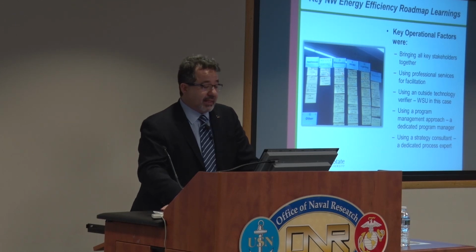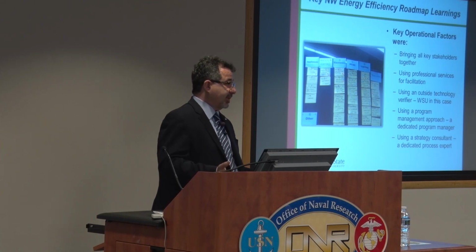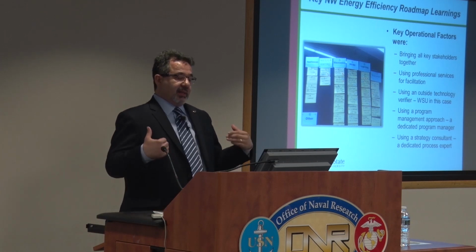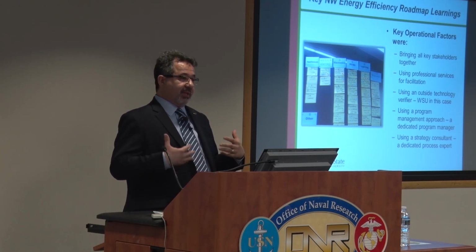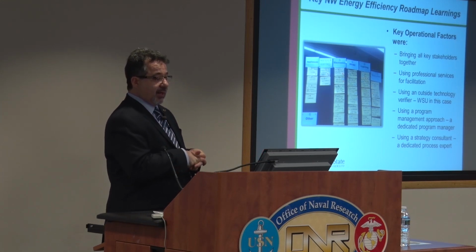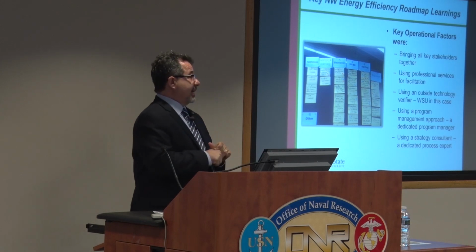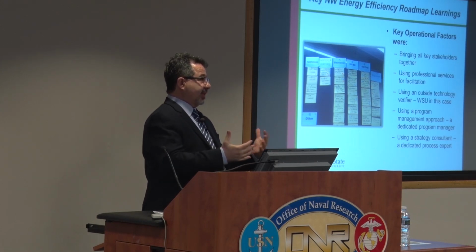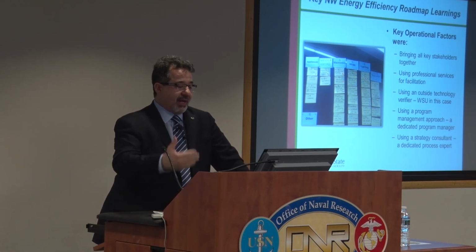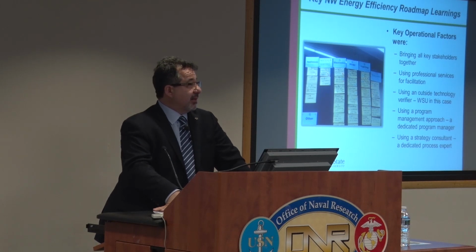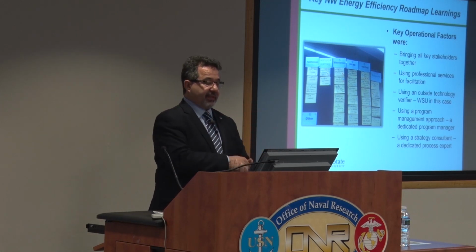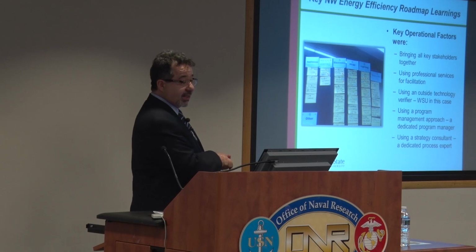Because when I was at Intel, I didn't need another meeting or another process because I had to deliver this product. There were so many people on my head anyway, right? So it helps to bring credibility to the process, and of course, always a good idea to pilot the process. Now, when you invite these experts, everybody has their own agenda, right? They are experts, but they will try to push things their way. So to help with that, we use third-party judges, if you will. After every workshop, we would go to this group, and they would help us check if what they say is really happening.